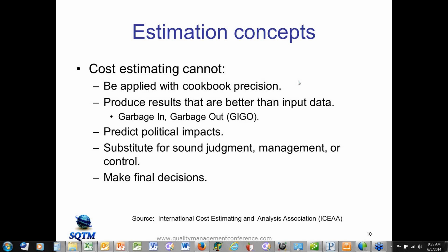But now let's say we did a project with 100 pages, and instead of 1,000 hours it was 900. Now we know we need a variable to shape for that. If we have a half a dozen or a dozen of these data points, in theory you only need 3, but it's better to have more for better curve fitting. It's basically a question of doing a curve fitting through that.